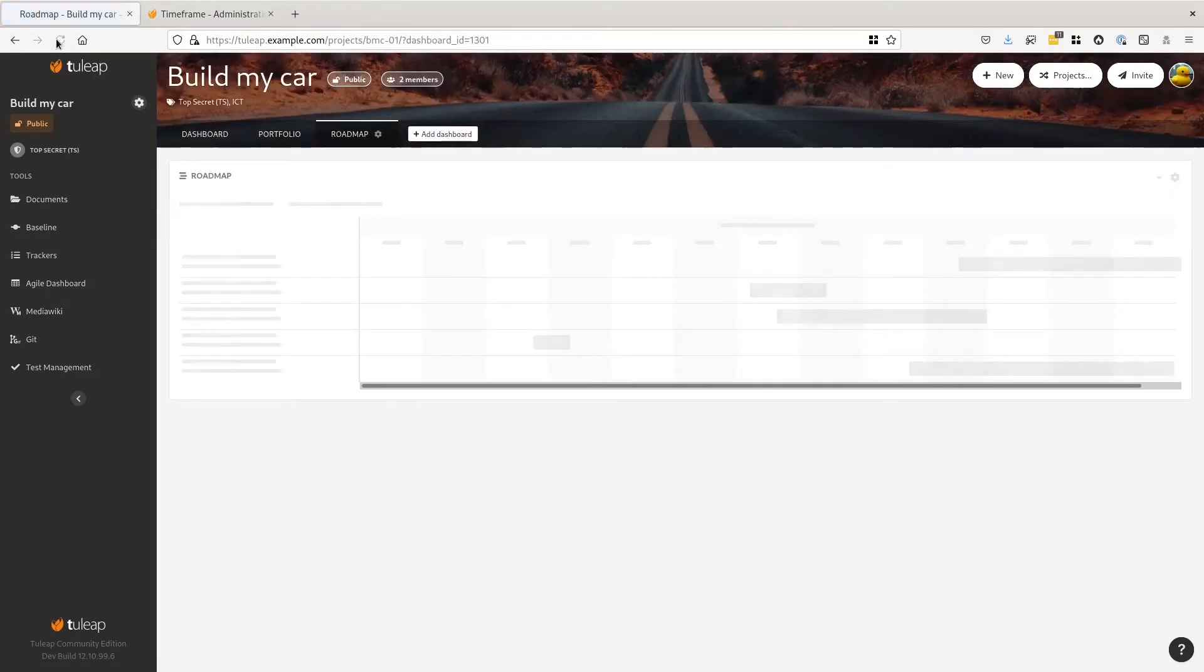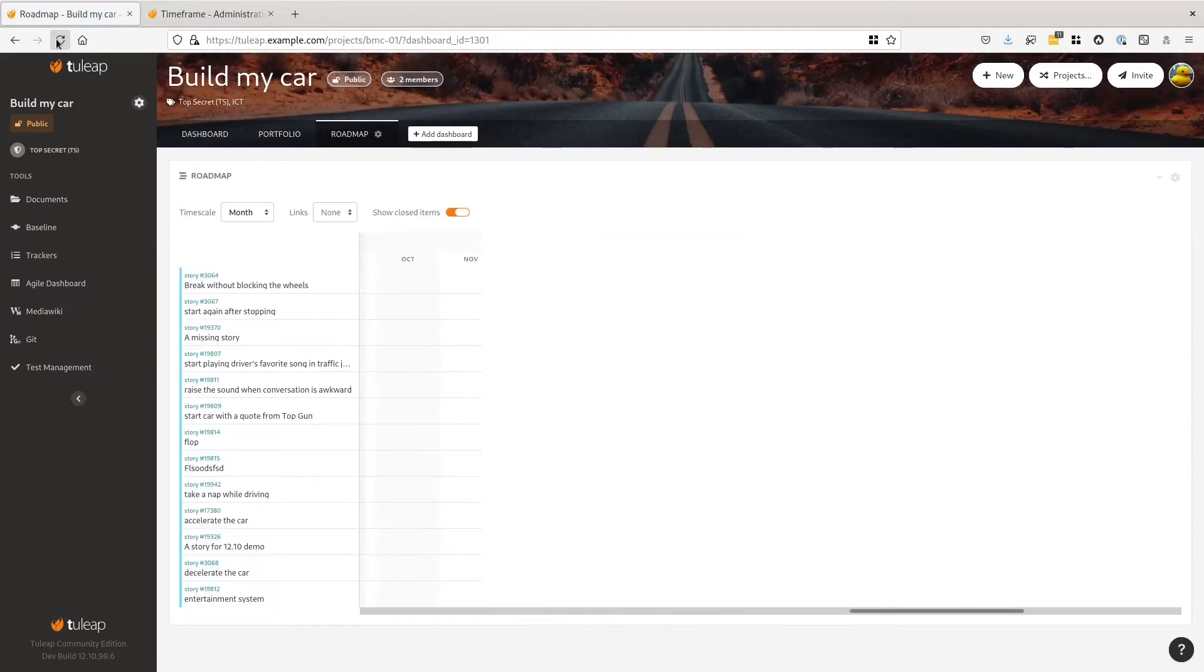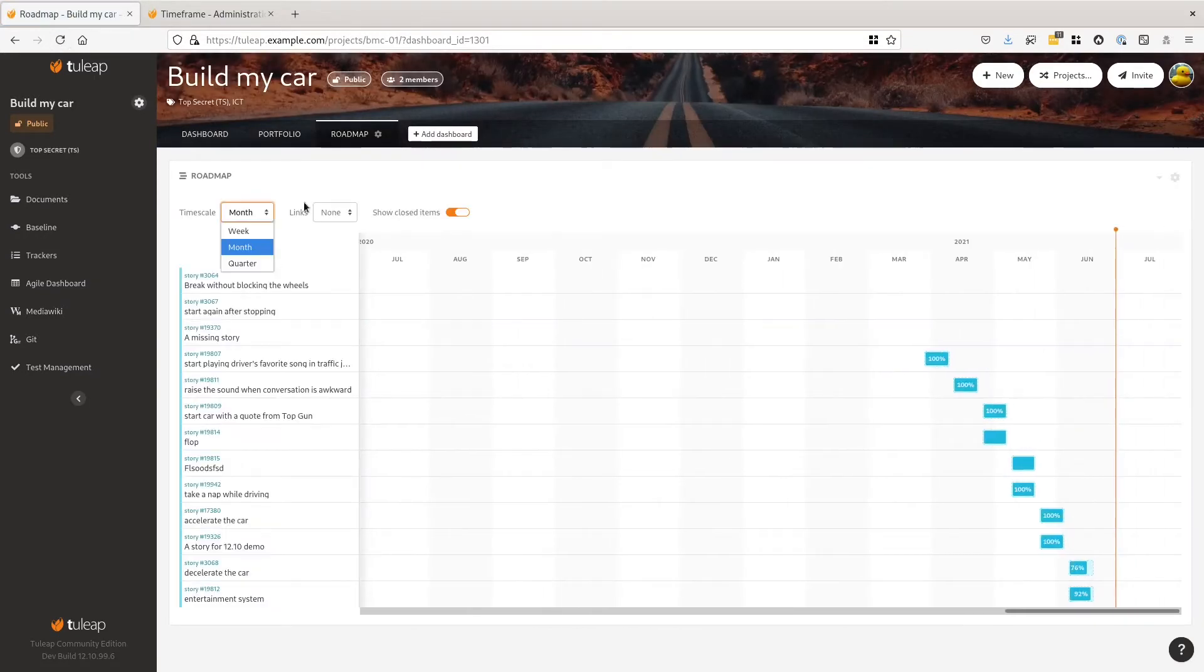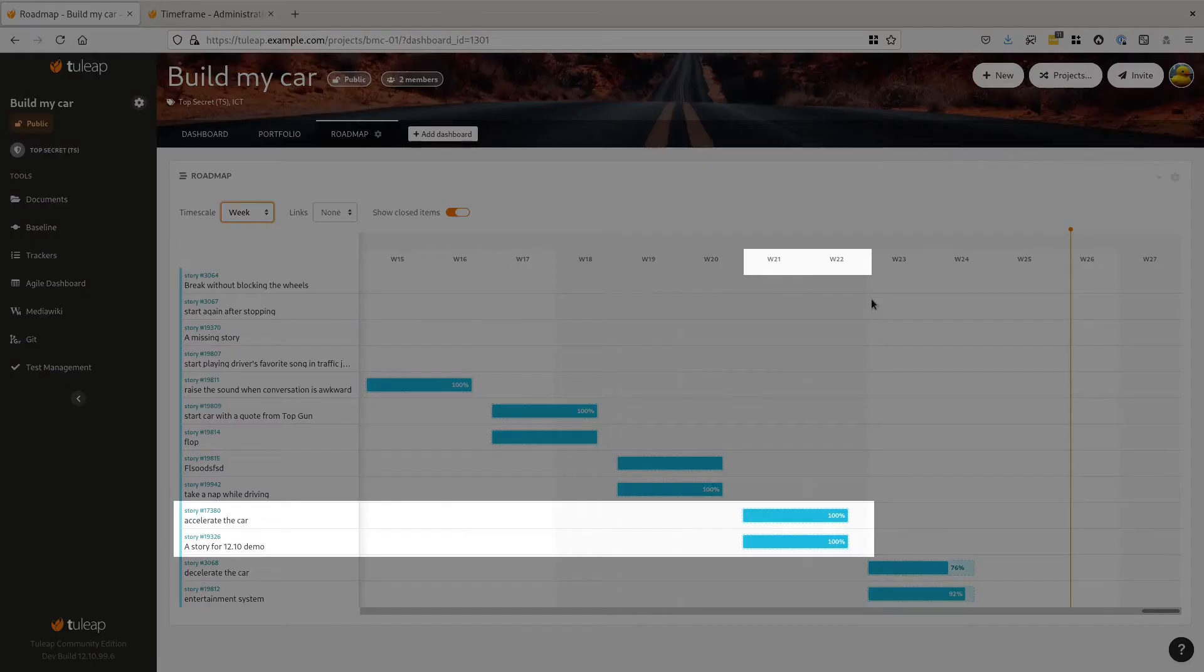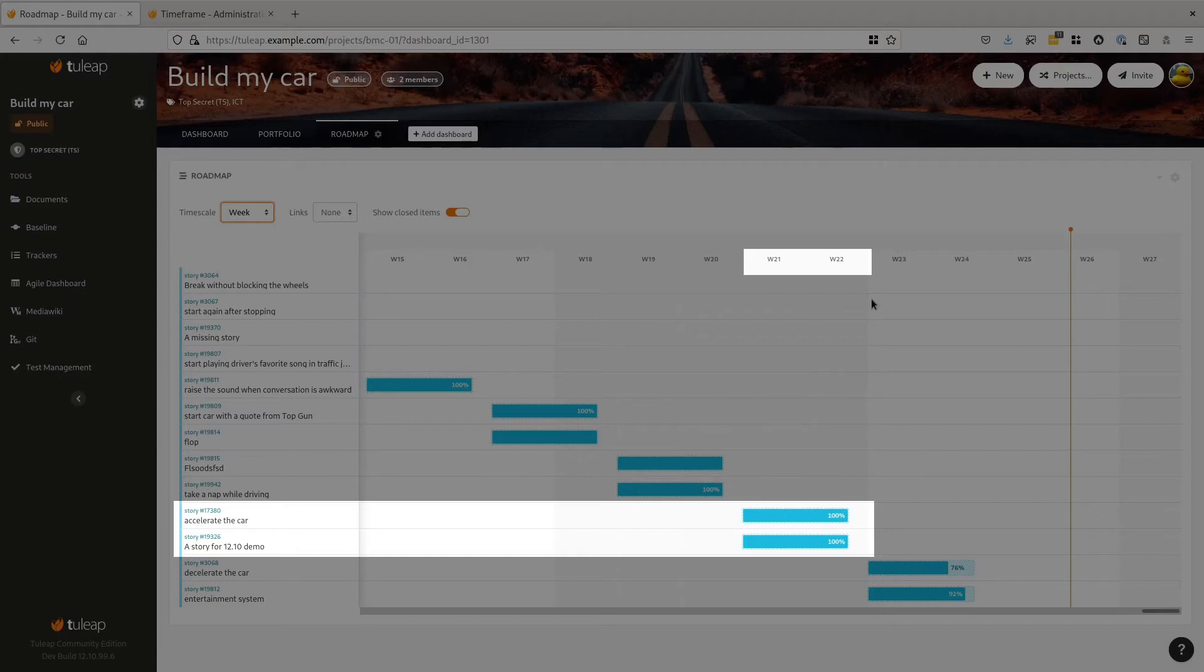Let's go to the roadmap to see the result. Reload the page and ta-da, something is now displayed. I'm going to change the scale to better see the details. Here you can see that each story takes 2 weeks because my sprints last 2 weeks.